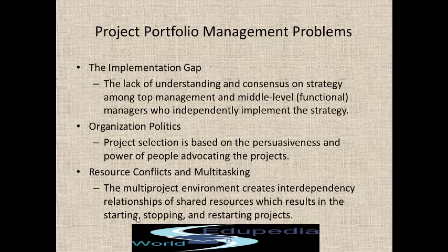That is also faced in project portfolio management, where resources are shared across projects. Their percentage of involvement, all those things need to be factored in at the beginning of the project, so that the schedule is properly put up and slack time can be avoided.